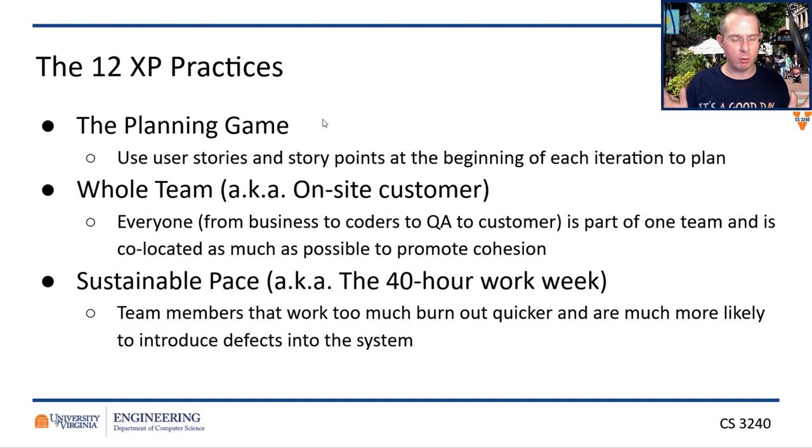If you push them out too hard, then they're more likely to introduce bugs or defects into the software. They're more likely to make mistakes. Every mistake that you make then becomes a problem you have to fix later. So what happens is you may push an extra 5 hours, 10 hours out of a person during a given work week, but because the quality of what they put out during that extra time is poor, you are now adding more time to the end of the project in order to correct the things that happened.